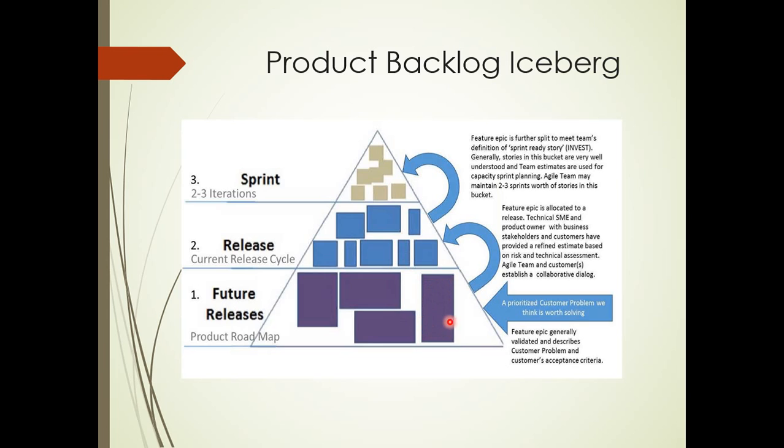these user stories or product backlog items are moved to the release cycles and placed into the release backlog. Release backlog is a subset of product backlog and is intended for the current release. Further ahead, the release backlog is moved to the sprint backlog, and these user stories or requirements are selected by the development team and built into the product during the sprint. Hence, the user stories defined in the product roadmap or vision are broken down into releases, and then further selected and broken down to the granular level in sprints or iterations.